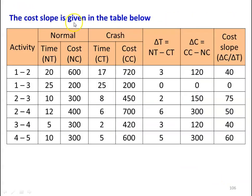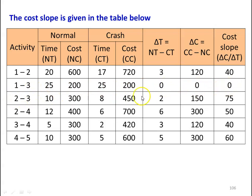Now we calculate the cost slope of the various activities. For activity 1-2: normal time 20, normal cost 600, crash time 17, crash cost 720. Delta T = 20 minus 17 = 3, delta C = 720 minus 600 = 120, cost slope = 120 divided by 3 = 40. For activity 1-3: no change, so delta T, delta C, and cost slope are all 0. For activity 2-3: delta T = 10 minus 8 = 2, delta C = 450 minus 300 = 150, cost slope = 150 divided by 2 = 75.